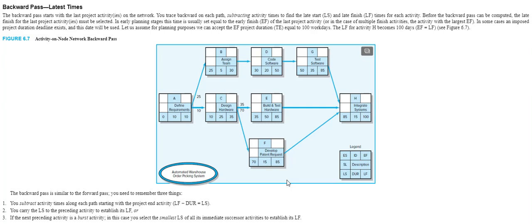Now we have a dilemma. Remember in the case of the forward pass, when you have multiple activities going into node H, the rule was you take the longest of the activities. When you're doing the backward pass, if you have multiple activities feeding into a particular node going backwards, you then take the shortest of the activities. So F is 70, E is 35, the shortest duration is 35.